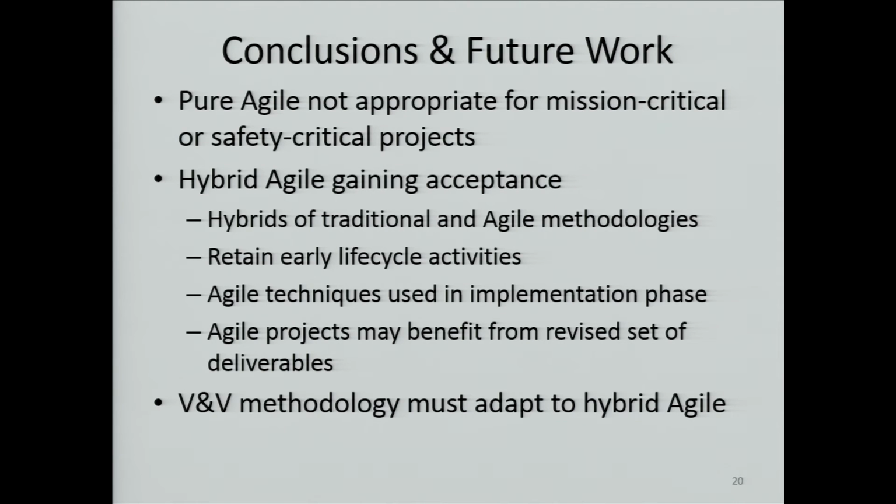I'm a little concerned about the assertion that you have to wait till the end of the process to do V&V. Why can't you simply map the requirements to the user stories, use a tool like Jira to manage your backlog, and then have your V&V team watch the stories so that when they come off the backlog, they can go find the developer and get in his shorts and then develop the V&V plan?